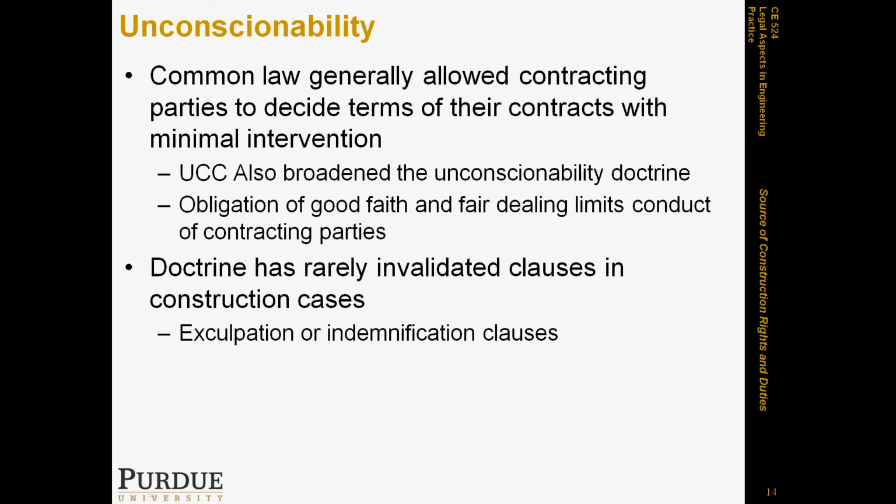For example, in one case in your reading, a subdivision owner's purchase agreement required arbitration in its dispute resolution clause, and that was considered unconscionable because it prevented people from the right to litigate. That was considered unfair to the weaker parties, because they aren't able to access arbitrators or defend themselves in front of arbitrators. They probably can, however, access the legal system, which is much cheaper and less inhibitive for them to pursue a dispute.